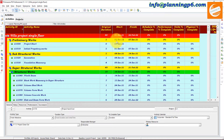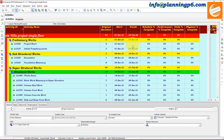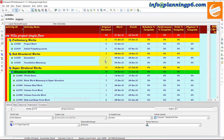Our project start is 1st December and finish is 22nd February 2022. We will demonstrate this in two steps: how we will complete before the finish date and how we will complete after the finish date. It will compute the actuals — suppose an activity is planned for four days, it will complete the actuals as per plan for all activities.